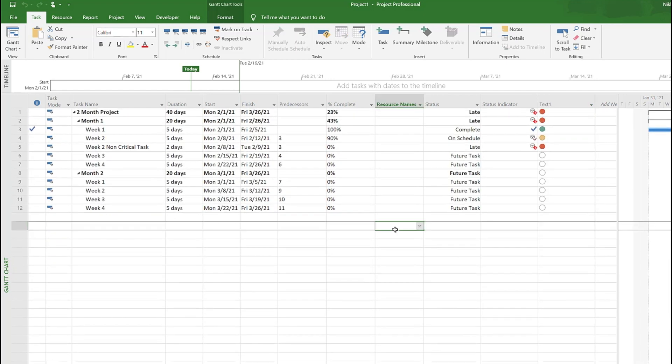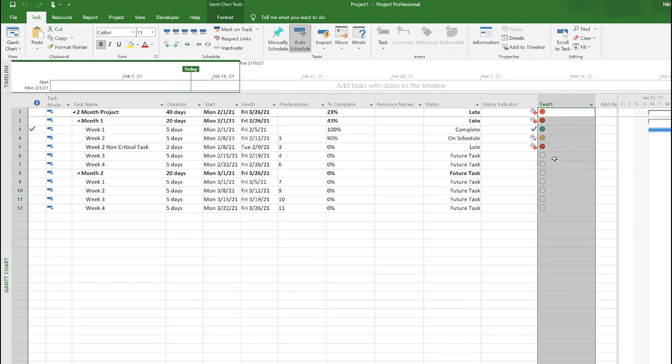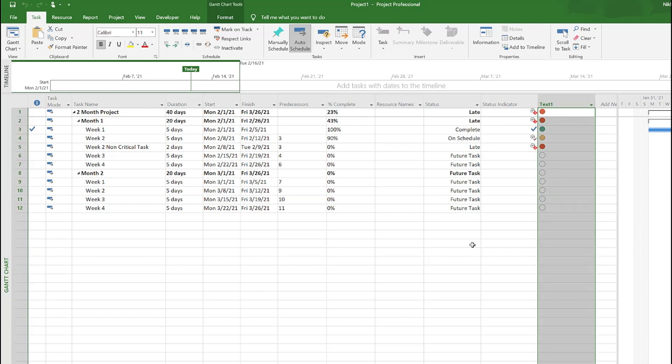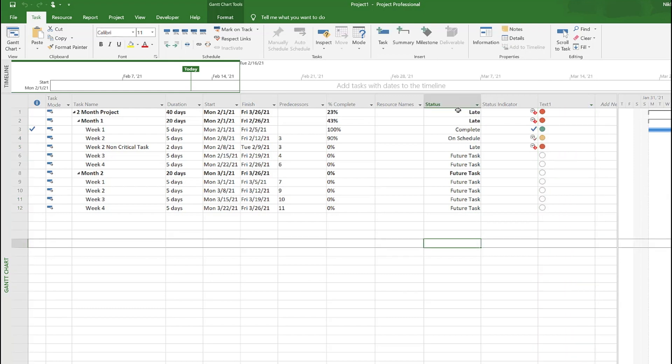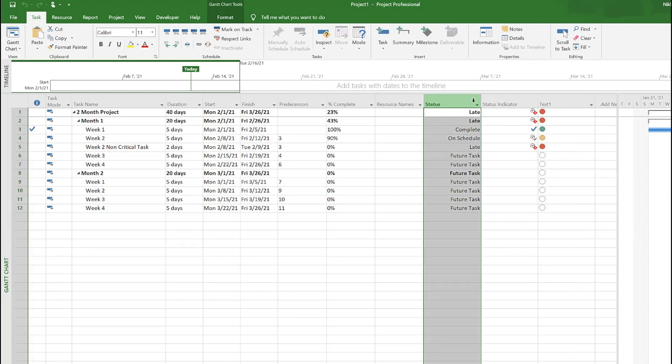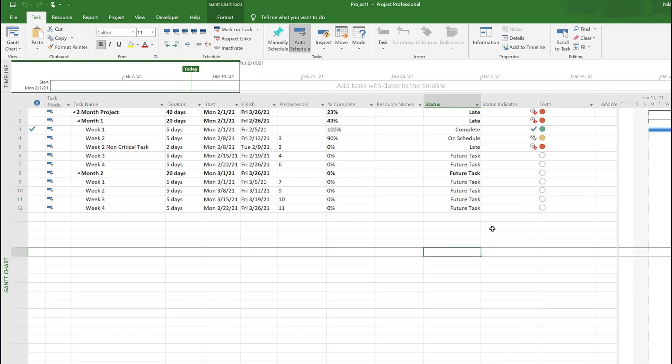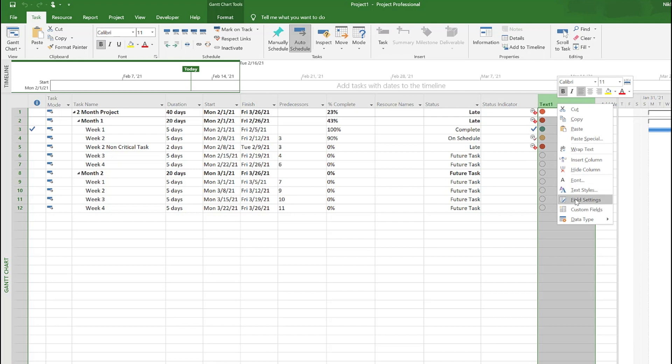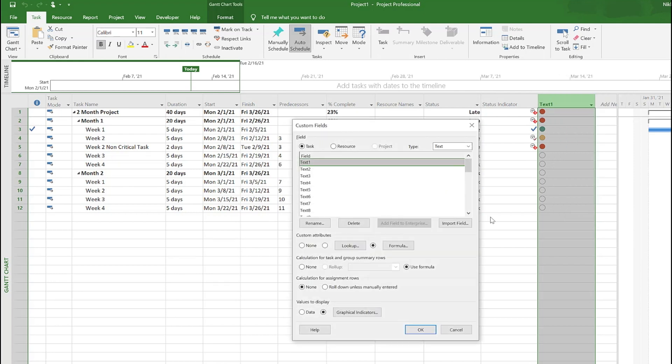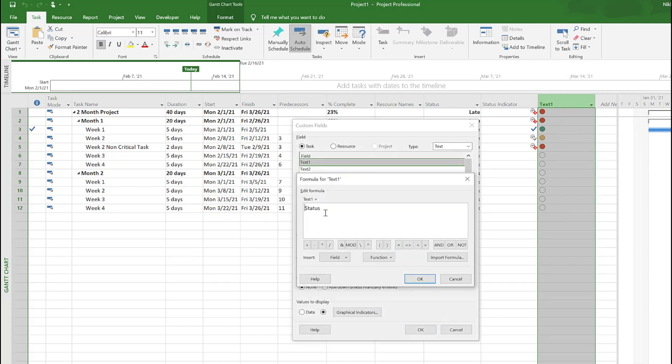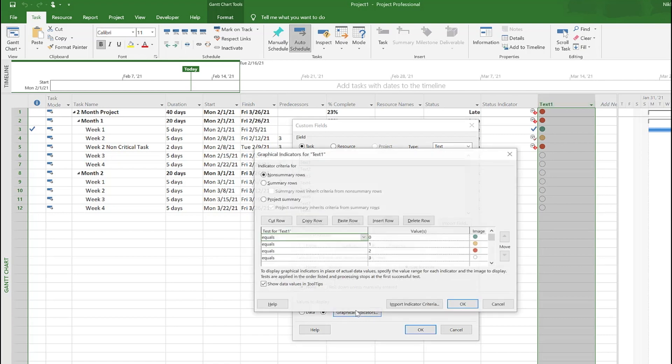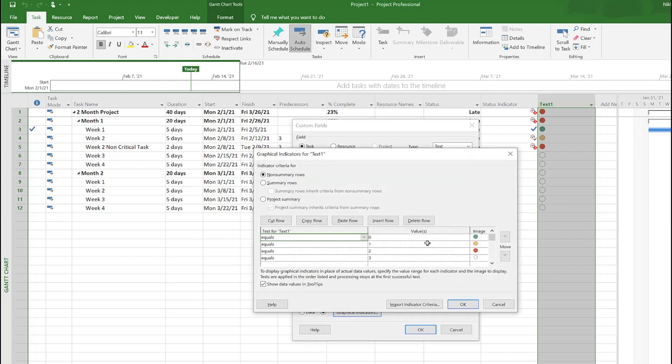That's what I wanted to show here. You can play with different colors and flags depending on what you like, but just understand that you have status and status indicators in MS Project available to use immediately. If you want a traffic light kind of thing, all you have to do is in the custom field assign a formula to pull the status and then assign a graphical indicator to convert those status return values to a graphical value.